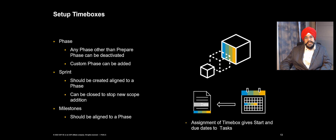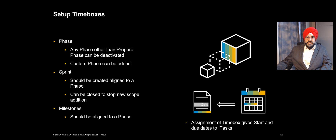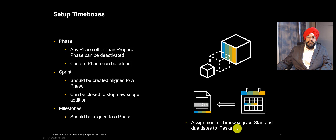You can also create sprints as optional, and if you do, we highly recommend that you align your sprints to the timelines of a phase. You can also create milestones and it will be very good if you can align your milestone definitions to a phase and then later use them for a specific purpose. How time boxes are used is very simple: when you assign a task to a time box, the dates from the time box are given to the task. So if I assign a task to a phase, my start date and end date of the task are automatically taken from the phase definition.